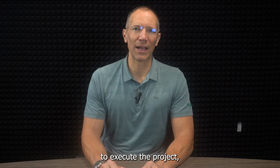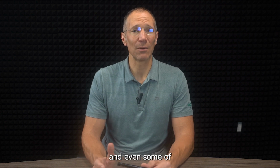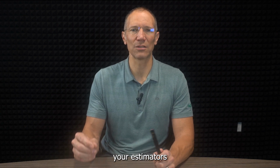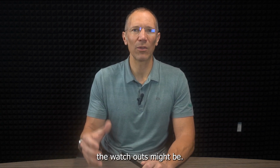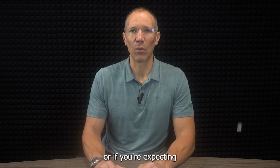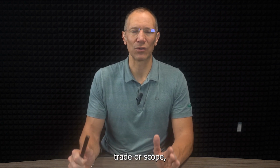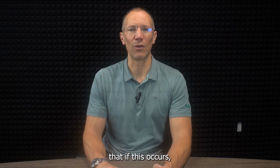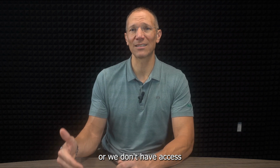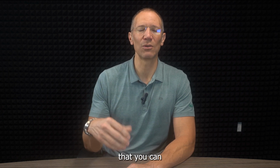When you're thinking about how you're going to execute the project, you want to know what some of those watchouts are. Your project manager and even some of your superintendents will be able to give you some insight, particularly to your estimators and in the budgeting process, of where the watchouts might be. For example, if you're expecting a certain amount of crane time, or a certain amount of lifts or the right scaffolding, whatever it may be in whatever trade or scope, there are things your project manager is going to know: if this occurs, then this is a good budget. But if this does not occur, or we don't have access to fill in the blank, they're going to be able to give you those watchouts and tools for clarity purposes that you can then ask about in advance.